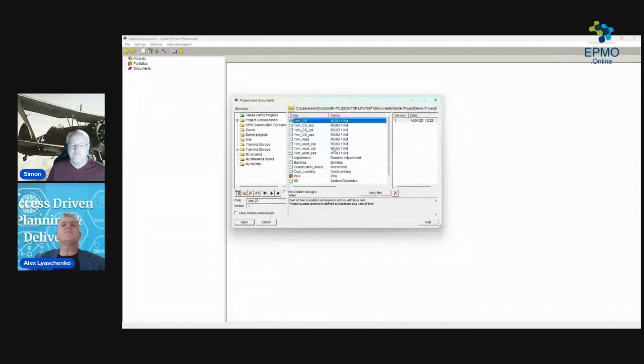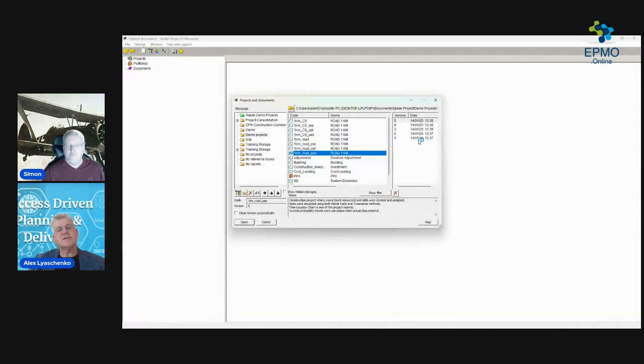Yep. And there is version control for all projects. And this version control is not just for convenience for users, it's actually used for analysis. So when you run trend analysis, the system knows all the previous versions, or you can point out which one you're interested in, so it can analyze what's changed over time, considering all different versions. This forensic analysis almost does not exist elsewhere, because you can actually go to a version and know exactly what happened at that time. You don't need to take the latest version and roll back to understand what was before.